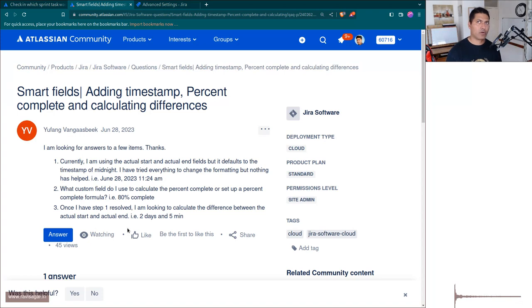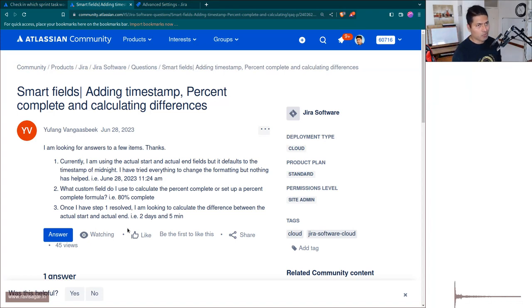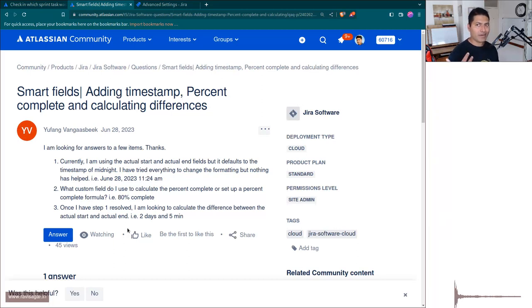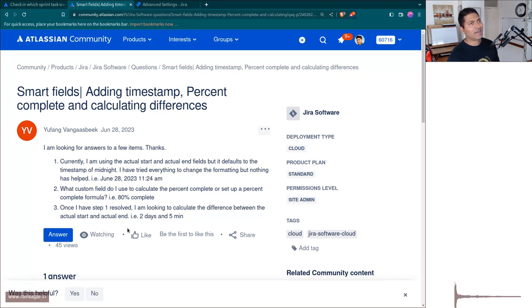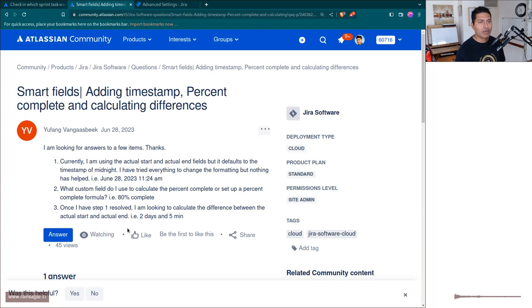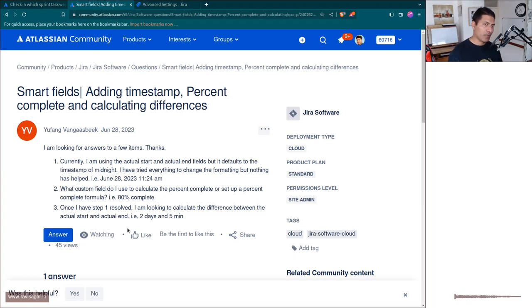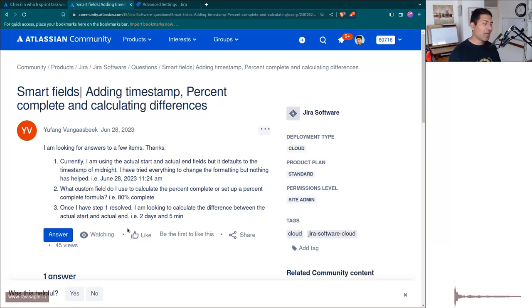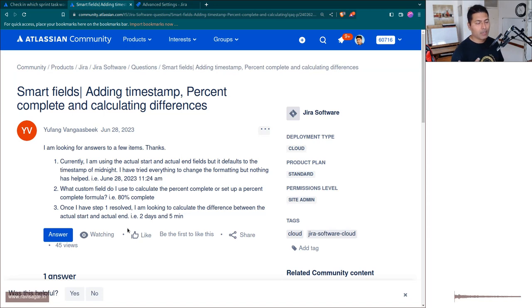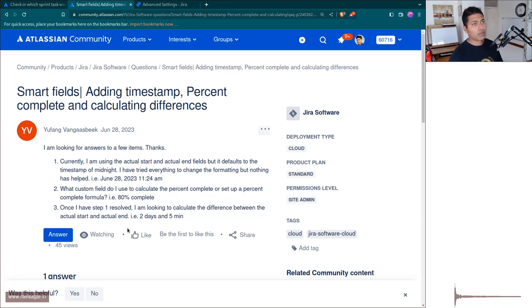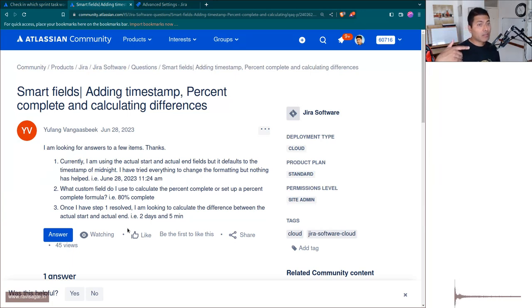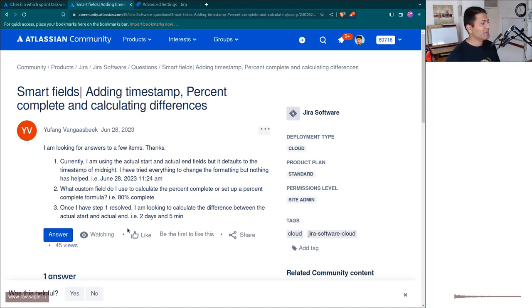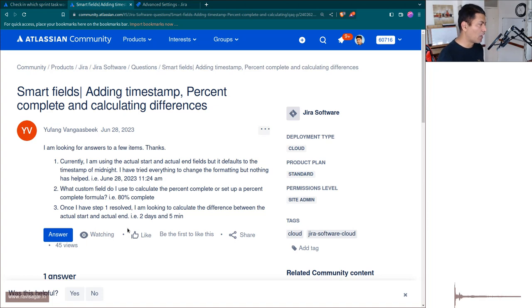In Jira, the progress is based on—it could be based on number of issues resolved, it could be based on story points. And it also depends on what scope you have and at what level you want to do it. So first you have to figure out what is the definition of progress. The most simple definition could be based on number of issues resolved. So if you resolve an issue, the resolution field is updated along with resolve date. Jira considers that as the closure of the issue. So that can be one measure.